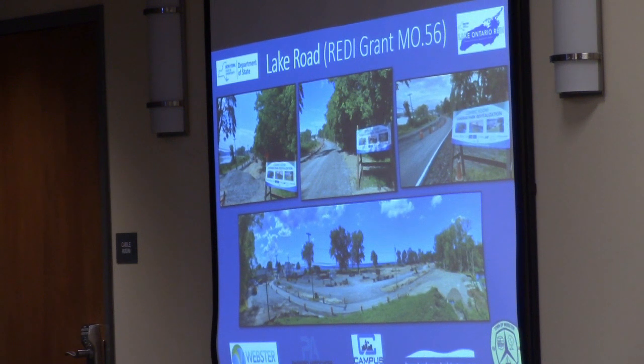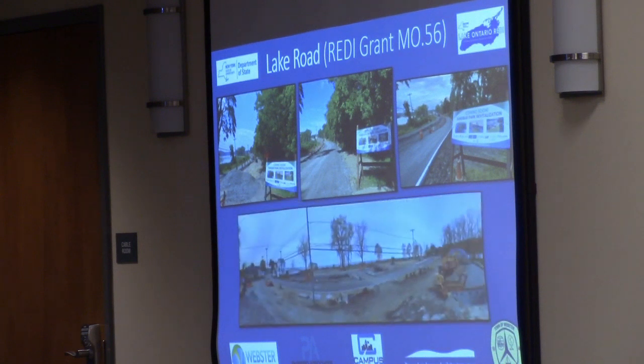This is an aerial view from our stockpile, so you can see where the one-way traffic was being routed and then the new road alignment in the stone closer to the north. And then this is what it looks like after the paving was completed and the striping. So you can see all the granite curbs in. Both the road and the parking lot on the north side have been paved, but they still remain to be topped, so that's something that will happen next year.